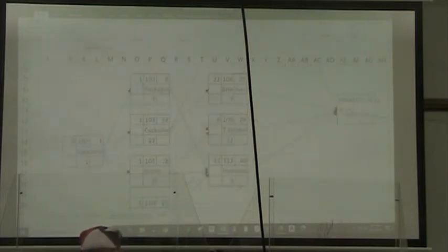Once again, we're going to go equals max, left parenthesis, of our early finish for building the kiosk, comma, our early finish for making the brochure, comma, our early finish for getting the trade journal, comma, and building wine to inventory, our early finish of that.